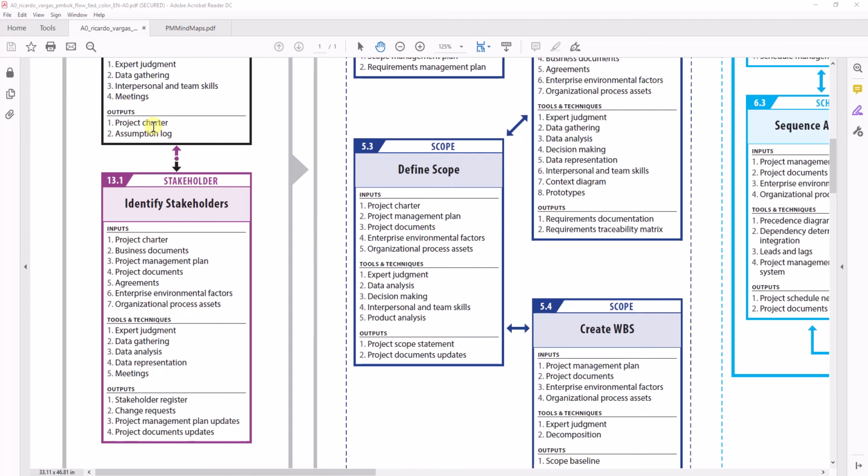So supporting stakeholders have your interest at heart, but they will not proactively go and advocate for your project. Leading stakeholders are those who will pull you. Supporting stakeholders, sometimes you have to push yourself, but leading stakeholders will pull you. So these are the various levels of engagement. And when you are assessing what kind of stakeholder each person is, while making a stakeholder register, you will also list the current level of engagement today, and the desired level of engagement tomorrow, where you want them to be.